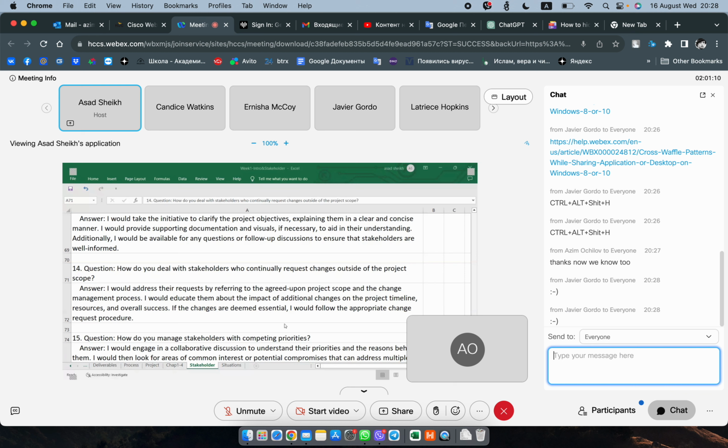And then once you do your impact analysis, then you would sort of know whether you can accept this change that they're requesting, right? You cannot accept their change unless you've done the impact analysis. Let's say you've done the impact analysis, and it's one week that you may have to add, and you say, okay, I probably have that 1 week in my schedule. I put in some extra time that we can take it in and we can do it, and there's no extra cost involved.